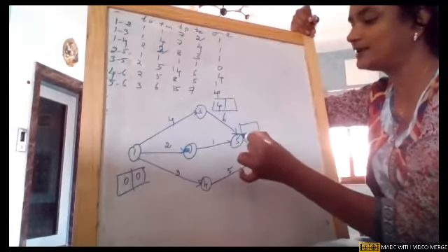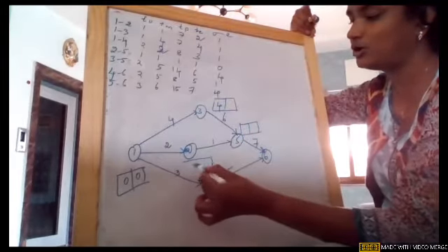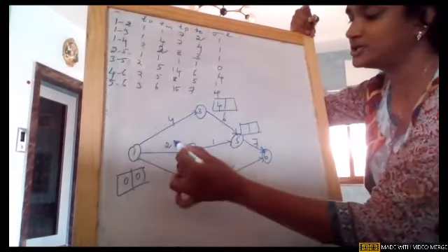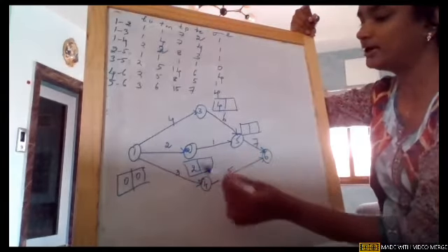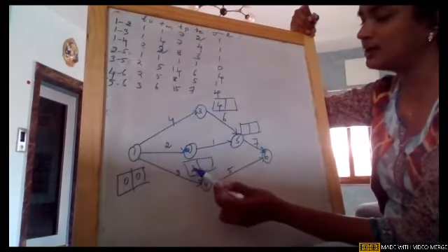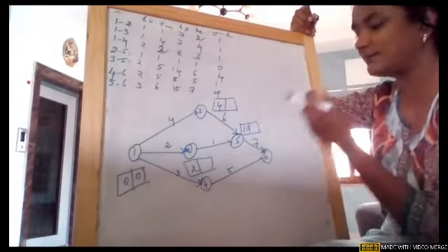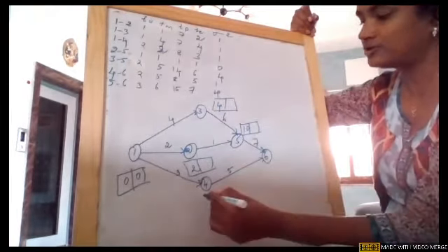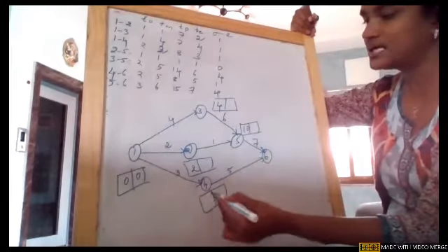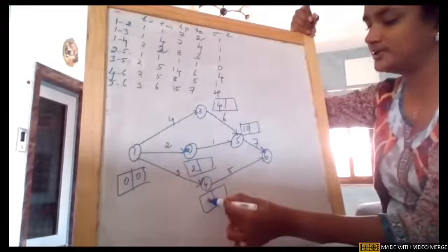On node 5, there are 2 arrowheads, avoid it for now. On node 2, single arrowhead, 0 plus 2, 2. On node 5, now you can see one arrowhead is giving 2 plus 1, 3, and the other arrowhead is giving 4 plus 6, 10. So obviously the maximum one. And come back to node 4, the value is 0 plus 3, which is 3.